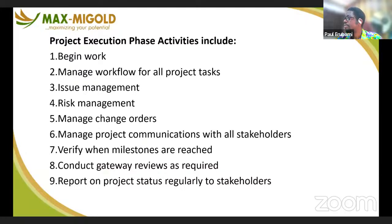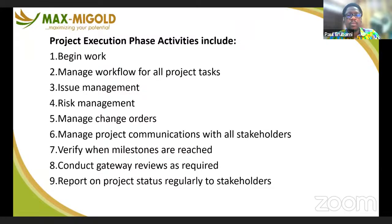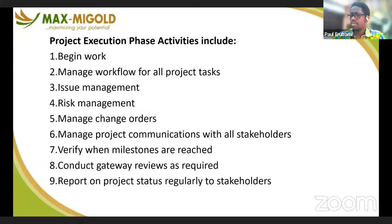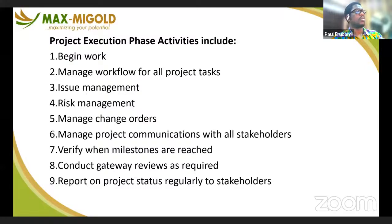You must communicate to project stakeholders regularly and verify when milestones are reached. You are supposed to create milestones for the project and know when those milestones have been reached, as it makes it easier to identify and track them. You need to conduct gateway reviews as required — these are gate points where, when you reach a milestone, you review your activities to find out if you are making good progress or lagging behind.